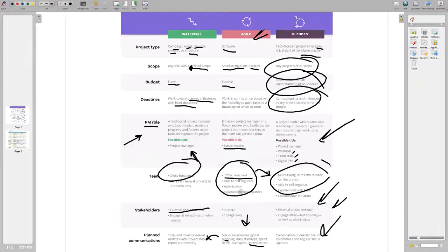So that's kind of a mixture of what I just mentioned here, like Waterfall, Agile, which is kind of a hybrid model, right? And what I basically do is I have 3 times a week a Scrum of Scrums, like Wednesday, Thursday, Friday. Then I have a bi-weekly meeting with the business involved, which happens every 2 weeks. Then there's also touch points, maybe Wednesdays, sometimes in the morning, 9 or 9:30 for 15-20 minutes with the designers, because the designers are also part of this product that I'm currently managing, right, for this telecom company, right?